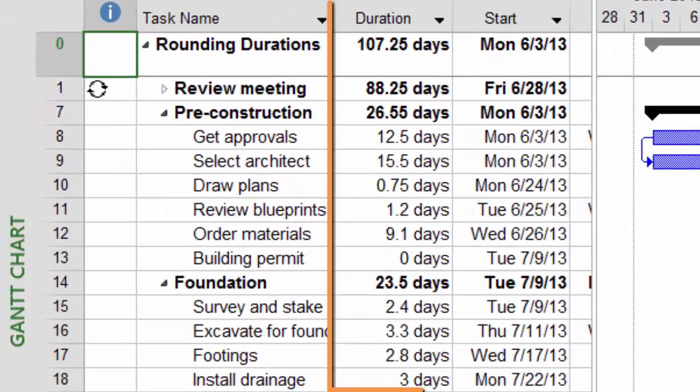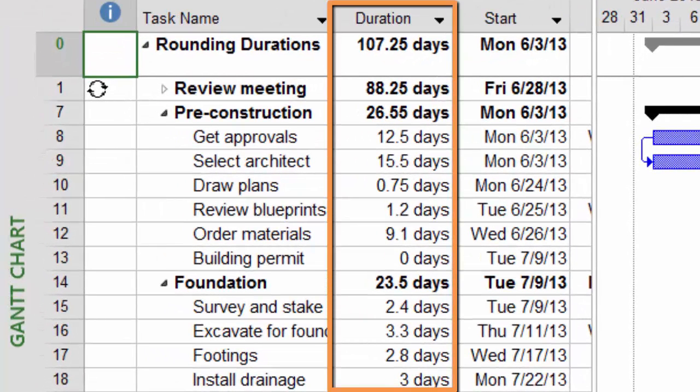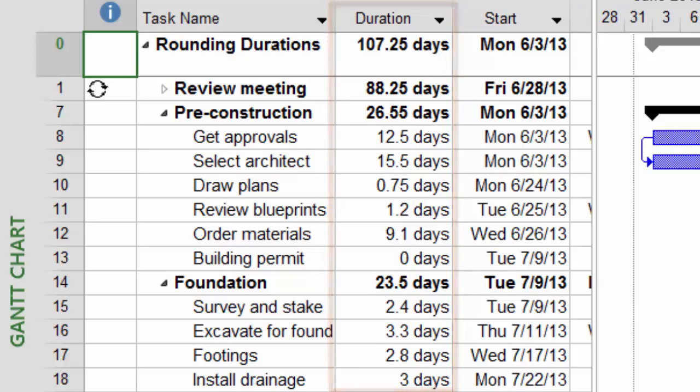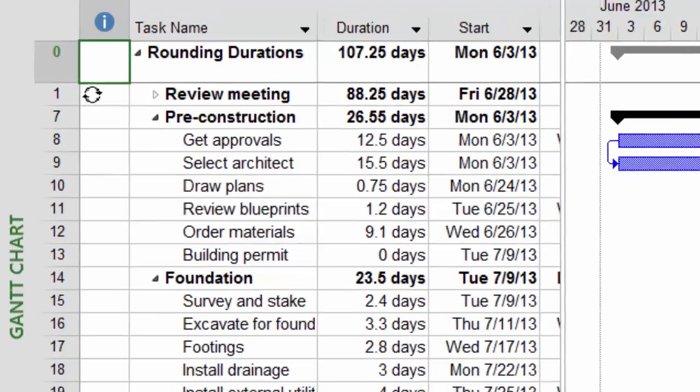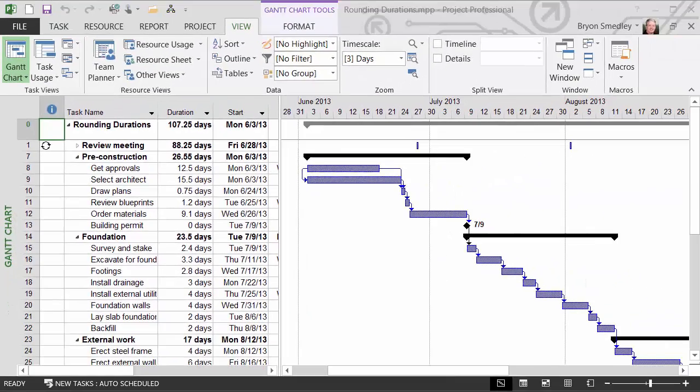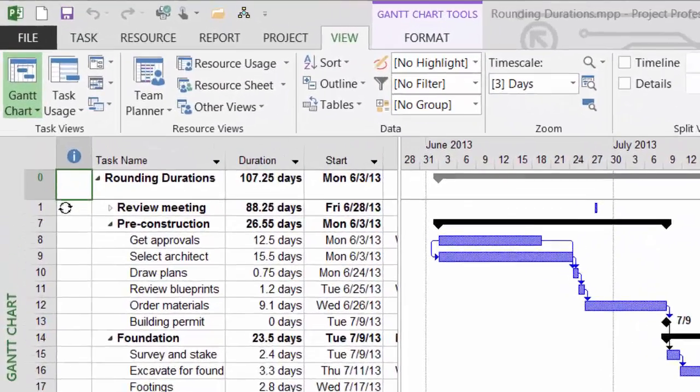As you can see, several of my tasks have fractional durations, and when those tasks are aggregated together, that also yields fractional summaries. Although you can't modify the duration field directly to round up or down, you can create a custom field that will perform the rounding calculation and then use the custom field in lieu of the original duration field.